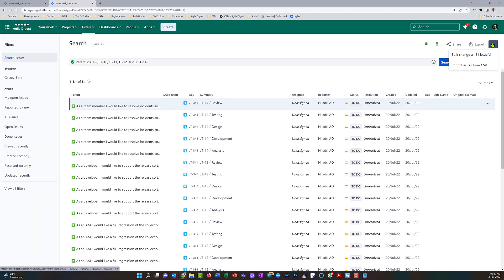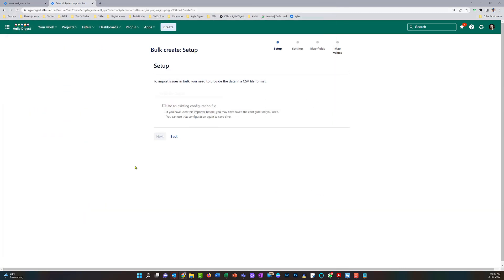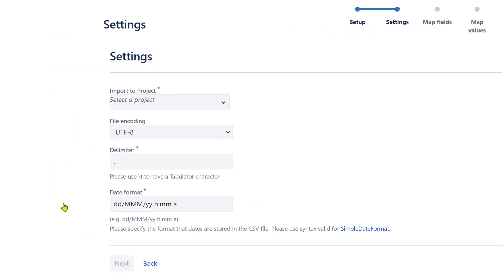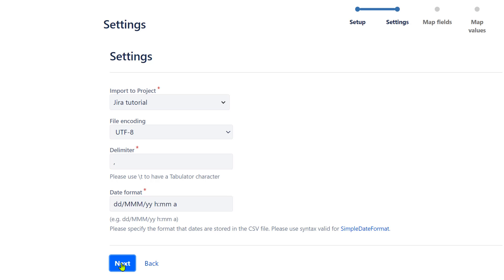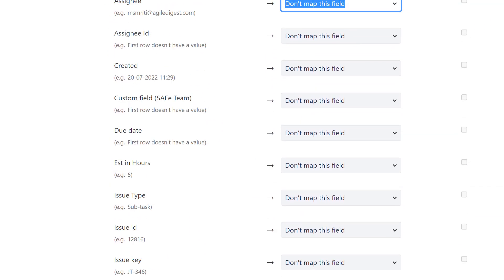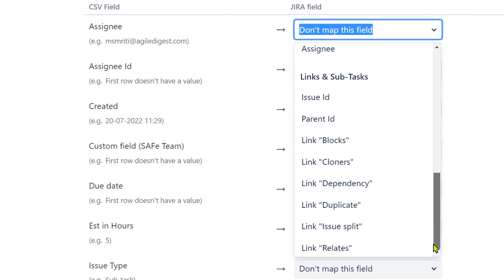I'll duplicate the tab and try to do an import. I'll choose the file first — going into the Downloads folder, selecting the file, and clicking Next. I'll select the project — Jira Tutorial — and click Next. One important thing: it shows all the fields in my CSV file, but when I try to map them, the original estimate field is not showing up over here.